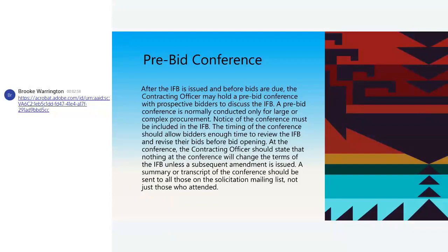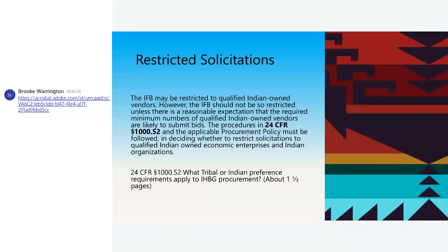You have to have ventilation systems. You can't puncture that. So they had to know what they were doing. It was a different mechanism of building than what some of them were used to. So they were required to attend that pre-bid conference before they submitted a bid. And then we had people there to instruct them and tell them exactly what they would need to do.